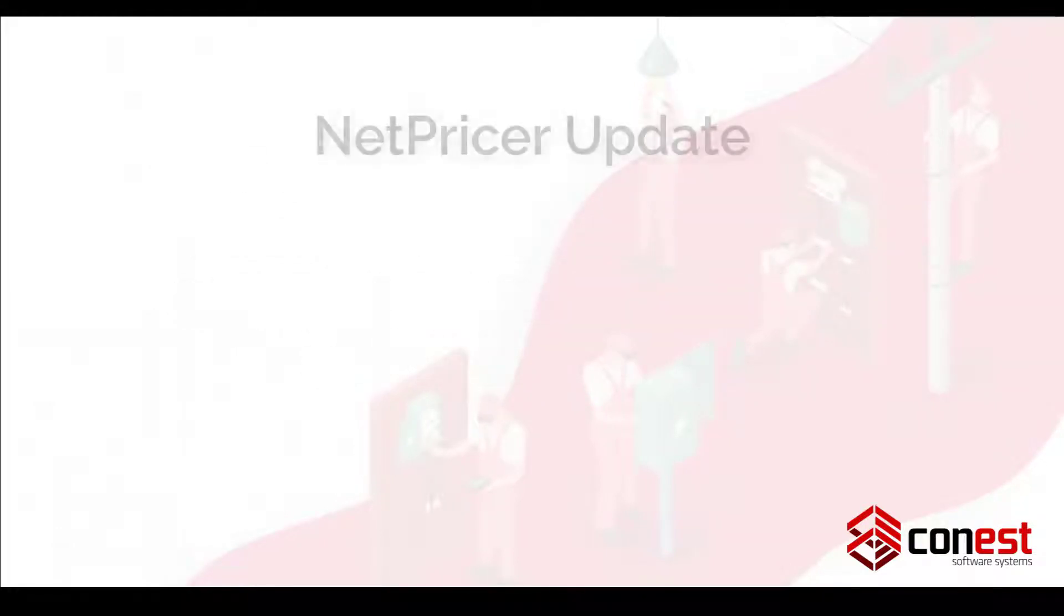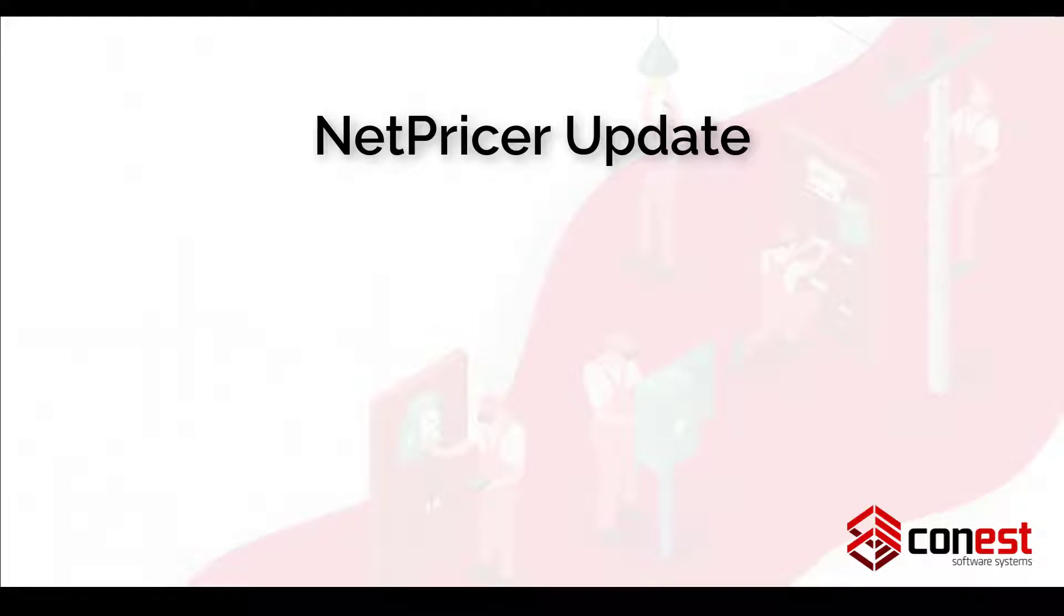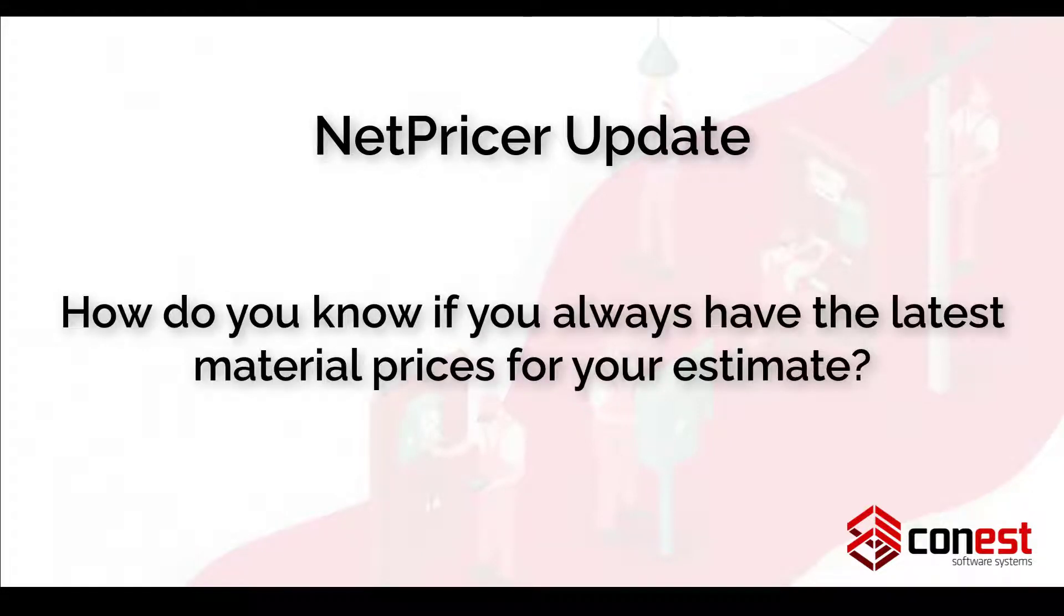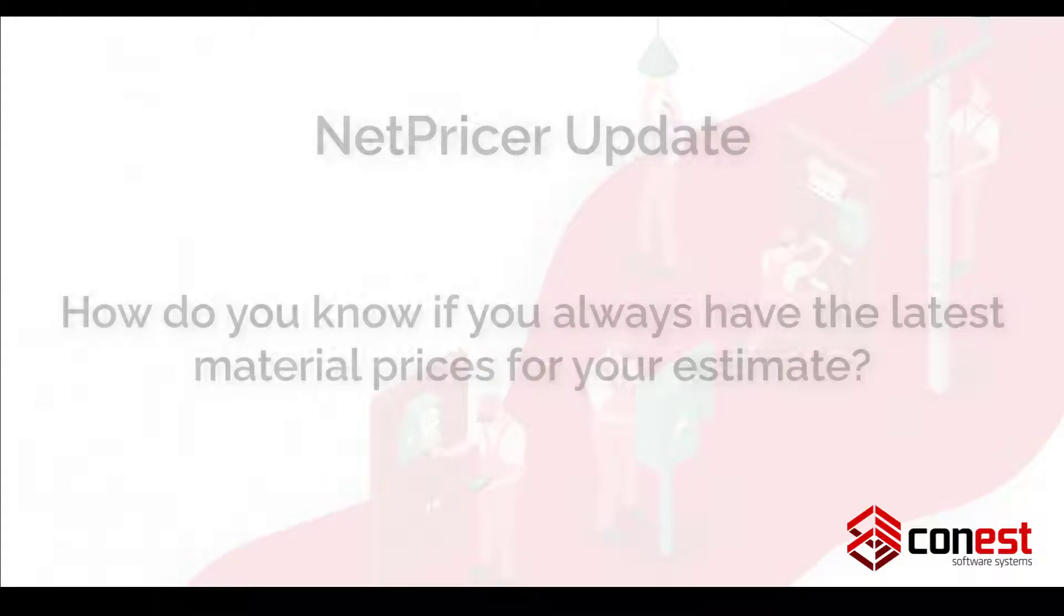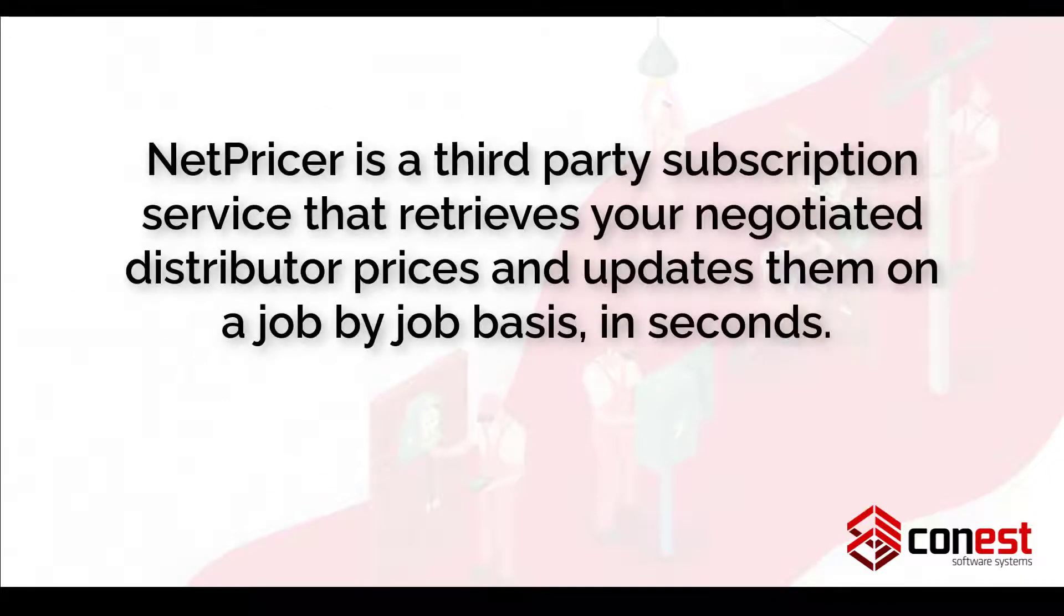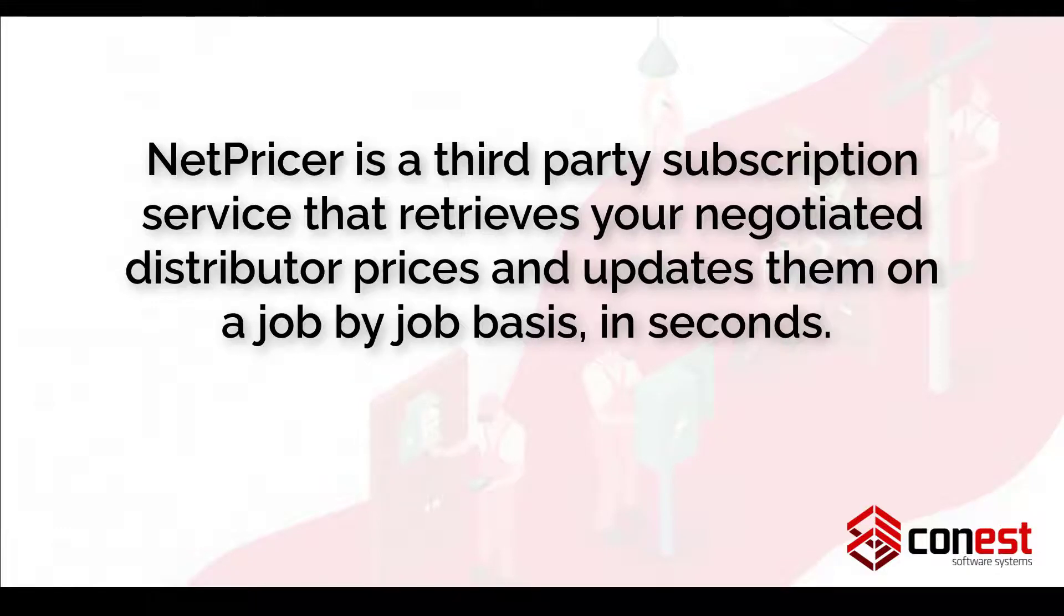Feature number four, IntelliBid's NetPricer Update. How do you know if you always have the latest material prices for your estimate? NetPricer is a third-party subscription service that retrieves your negotiated distributor prices and updates them on a job-by-job basis in seconds.